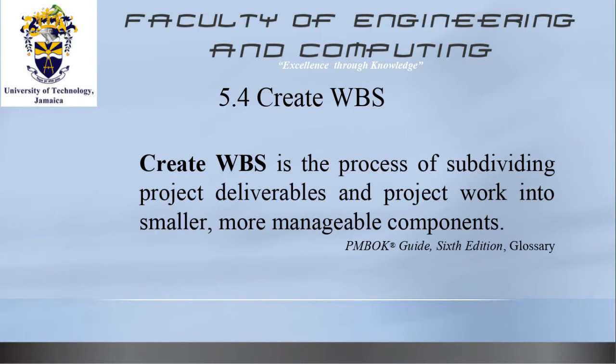So one of the first things that we need to do, we need to perhaps break down the work into project management. So project management will become a component. Under project management, what we will do, we will initiate a new design. So we are assuming that we already have a project charter to undertake this job, right? So we need to design the new building. And for us to design, we need to do surveying, we need to do a number of preliminary works. When we do our surveying, we get our architect, we do the design, we engage our stakeholders to ensure that this is the design that we want.